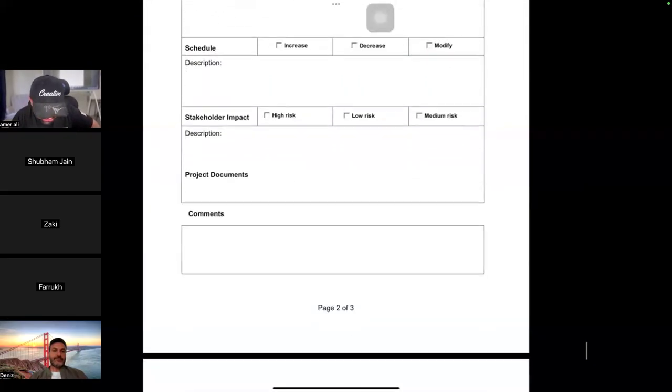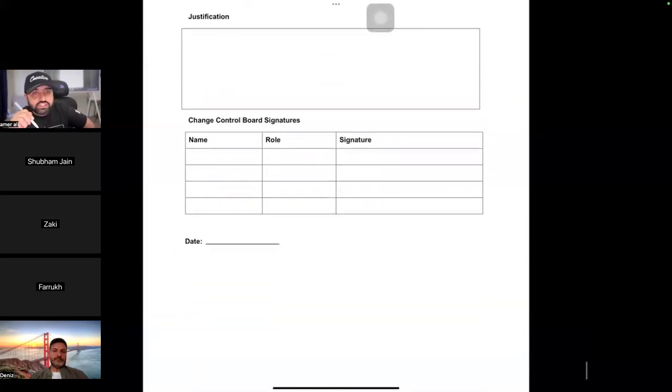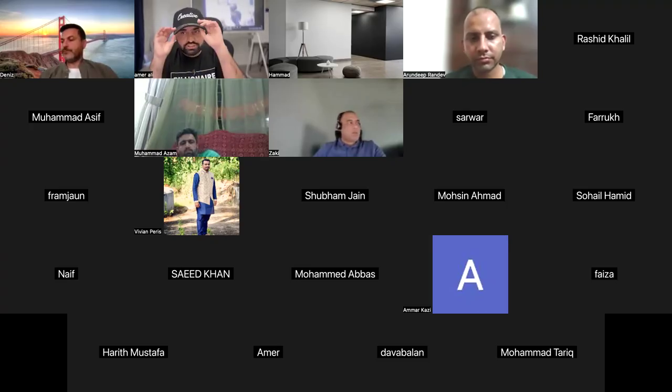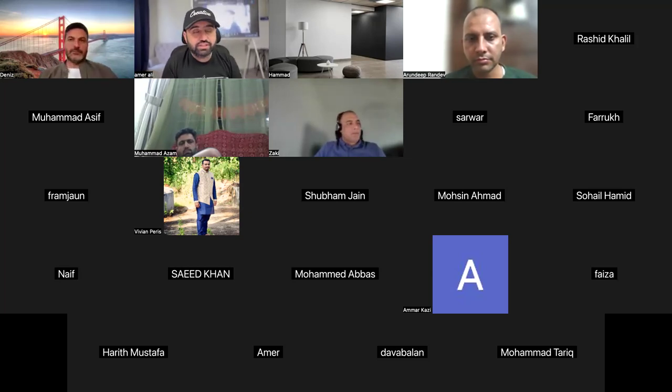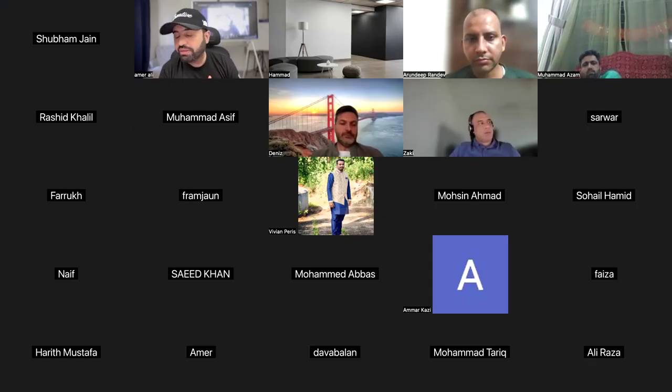This entire change goes to the change control board. Now here, the change control board approves or denies it. A very important thing: when the change goes to the change control board, it must already be written into that, and the impact must have been done. Bilal Masood, this is already with you. This is in the Google Sheet. I'll show you at the end.